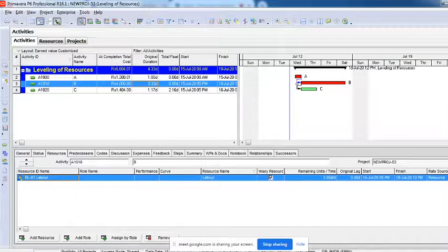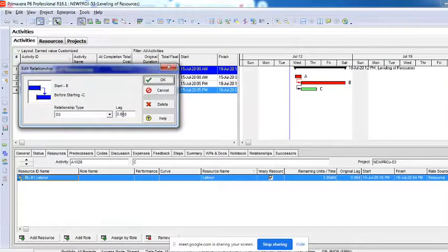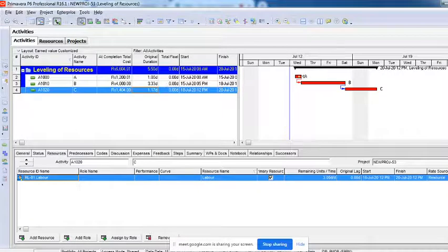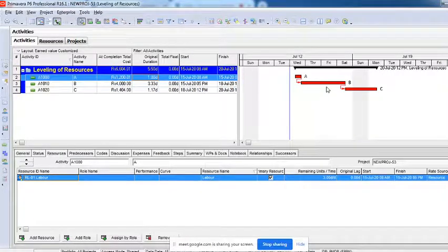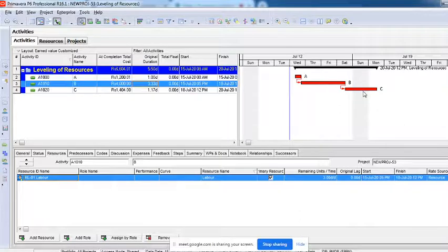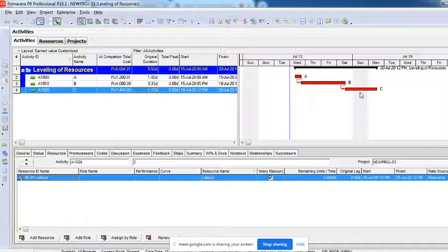from start to finish to start to start, because you know we have 3 labors per day, right? So I'm assigning all 3 labors on activity A, all 3 labors on activity B, all 3 labors on activity C per day. Getting my point? We are just adding all the resources per day.